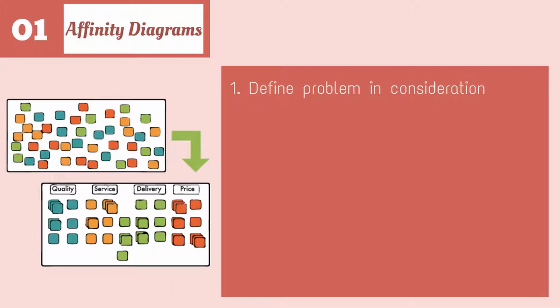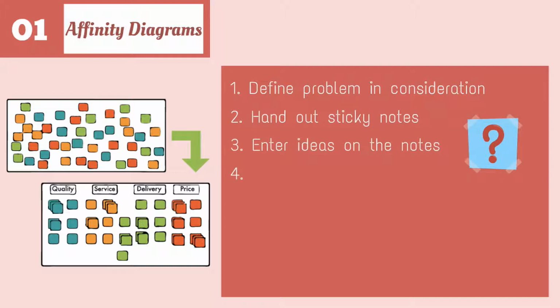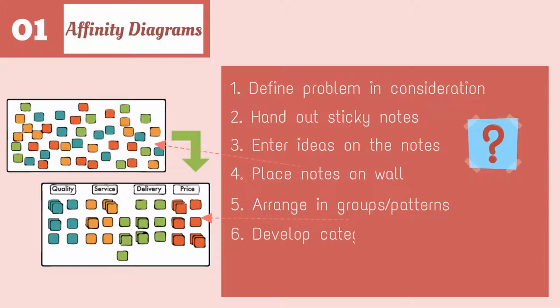Define problem in consideration. Hand out sticky notes. Enter ideas on the notes. Place notes on wall. Arrange in groups or patterns. Develop category for each group.